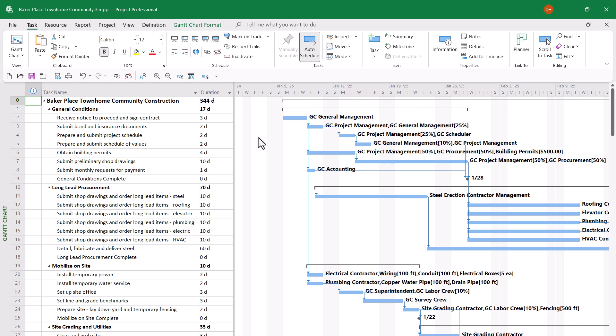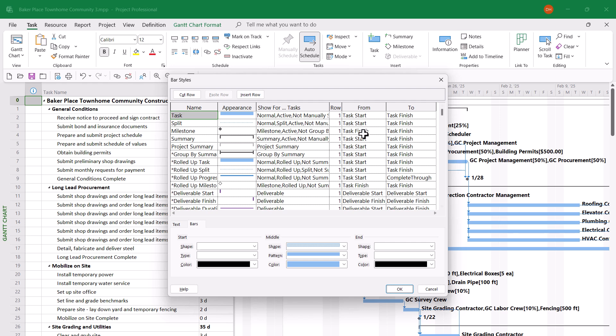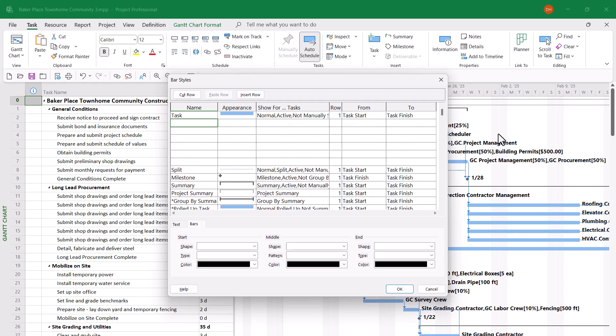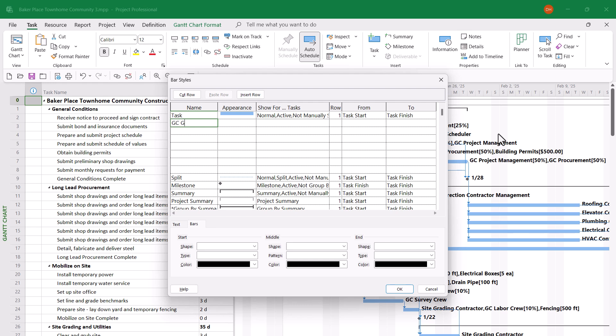I'll also drag the split bar over to the right edge of the duration column. To format the Gantt chart screen, all I need to do is double-click in the white part to display the Bar Styles dialog. In this dialog, I need to insert 7 new blank rows for each of those 7 custom fields I created. I'll select the Split item and then press the Insert key on my keyboard 7 times. Now I need to insert the definition for each of these Gantt bar colors. The first one I'm going to call GCGM, for GC General Management.